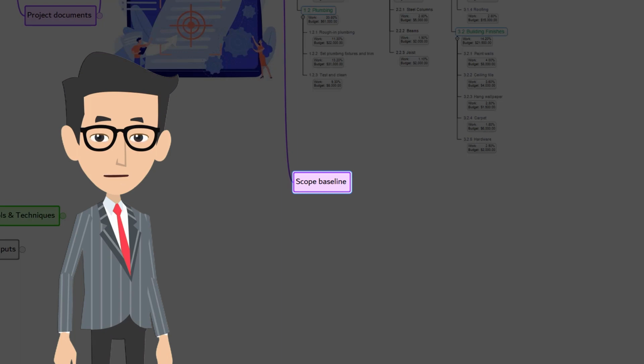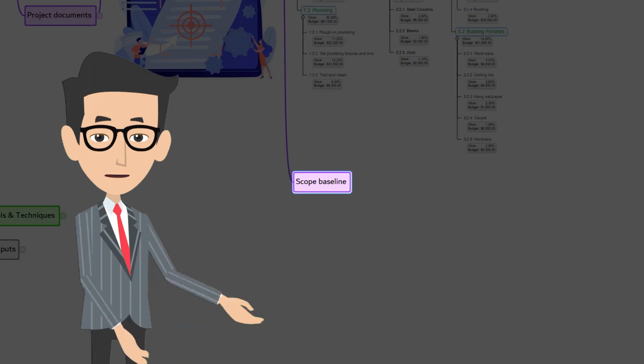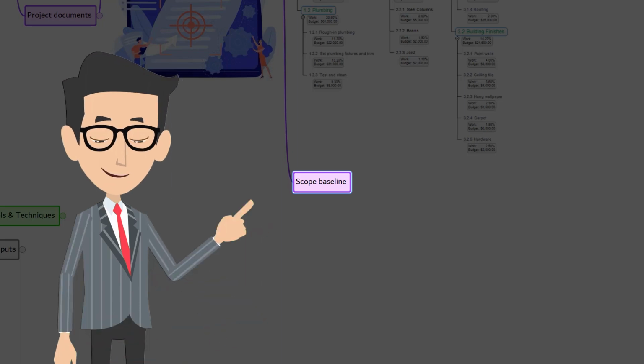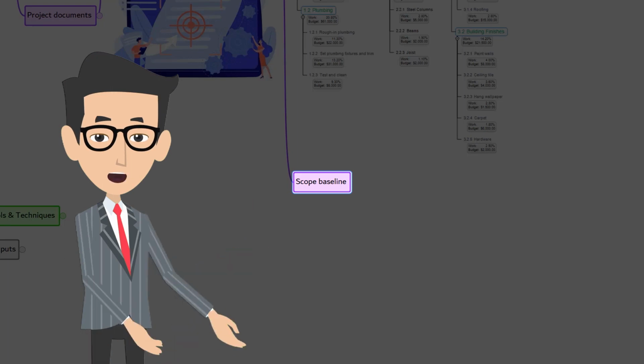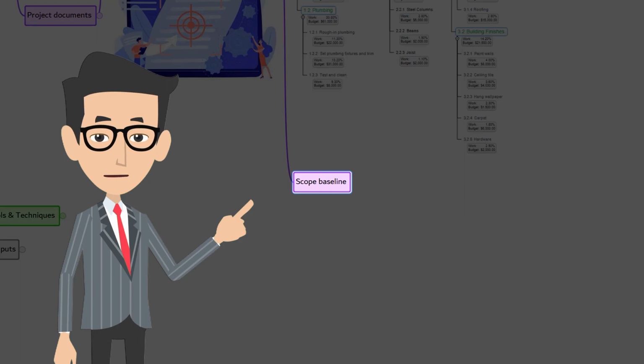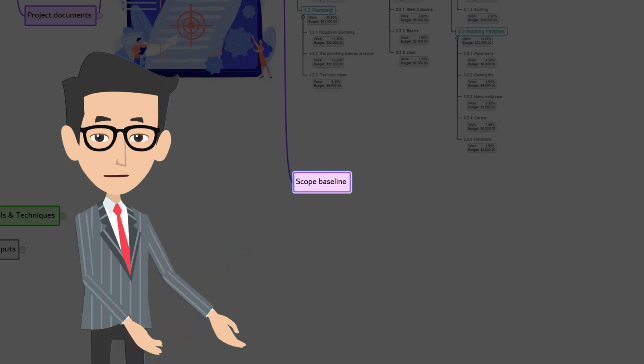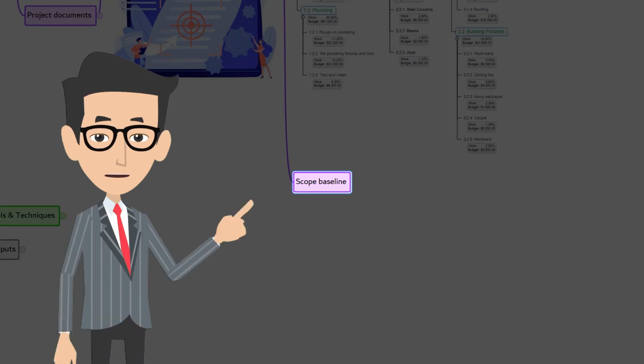Now a change request is raised. It should go through the change request process to get approved. This approved change request has to be implemented in the project as part of the deliverable. To make this deliverable, you may have to carry out a new set of activities. Since there is a change in scope, obviously the activities that need to be carried out will also change. So will the WBS dictionary. This is the reason the scope baseline includes WBS and WBS dictionary along with the scope.